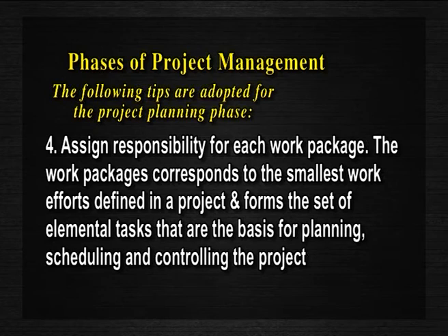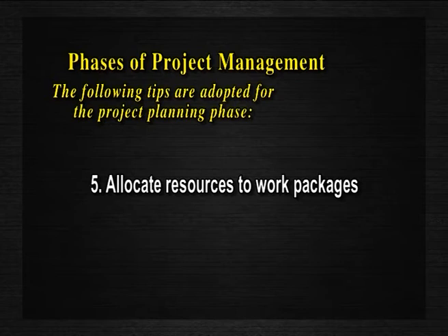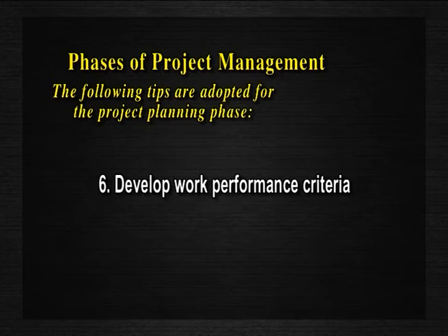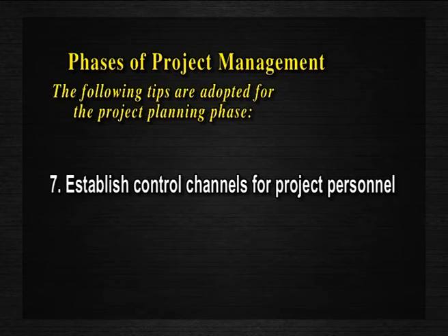The work packages correspond to the smallest work efforts defined in a project and form the set of elemental tasks that are the basis for planning, scheduling and controlling the project. Allocate resources to work packages, develop work performance criteria, establish control channels for project personnel.